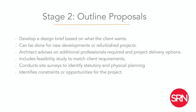Depending on the scale of the project, you may need to undertake feasibility studies — for example, if you're putting up rental apartments in a particular area, what is the current rental income from those apartments? This becomes very important because construction can be very expensive, especially if you have to borrow money. Borrowing means construction comes at a cost, and you'll need to recover that cost through rental income, so the design must reflect the rent standards commanded in that area.